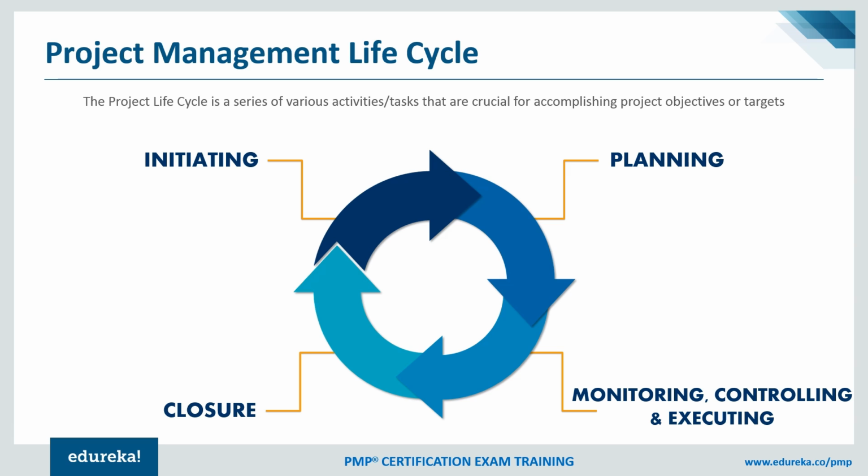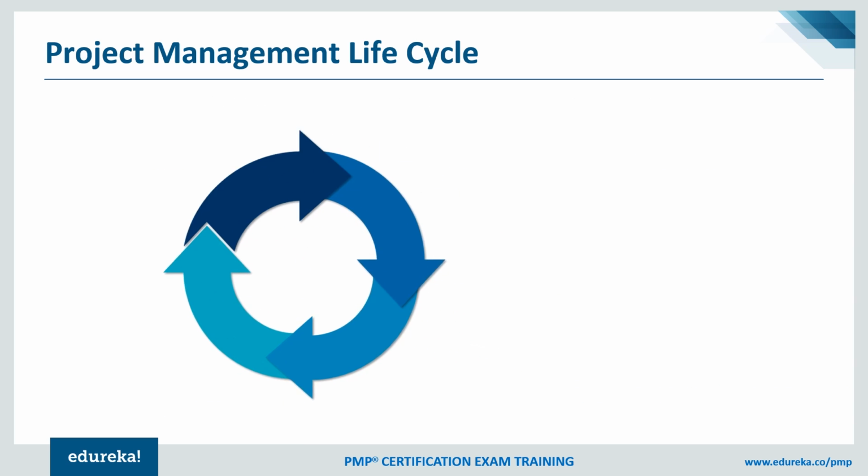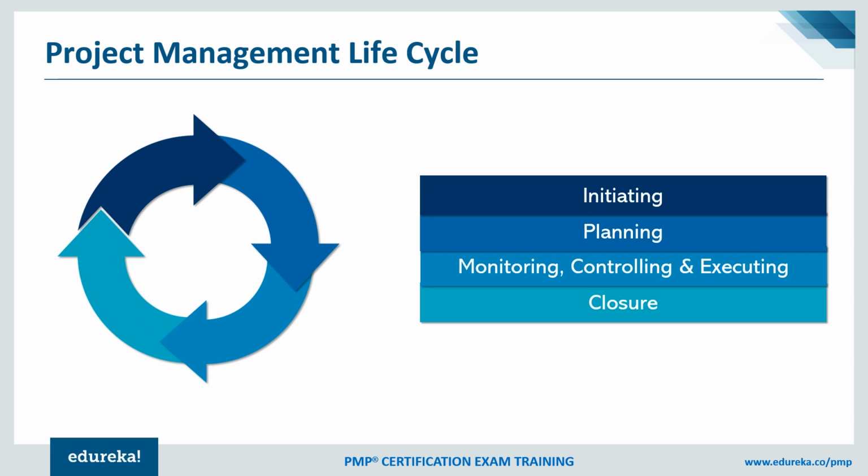If there are any ambiguities between the customer and project manager that you feel are not resolved and are still pending, even in the closing stage we would prefer to speak to the sponsors and document those things, because the project has to close on the given time. If with mediation we are still not able to resolve it, then we document those changes so that the PMO or other members can deal with it if required. Initiating, planning, executing and closing, and in between monitoring and control, which is a continuous activity. So these are the stages which go on one by one.